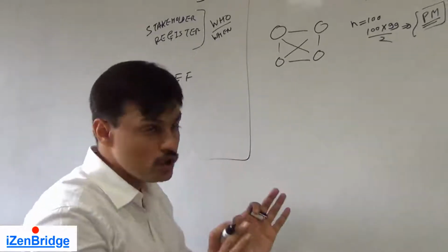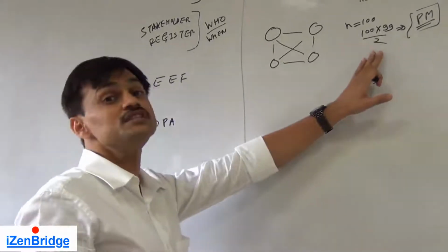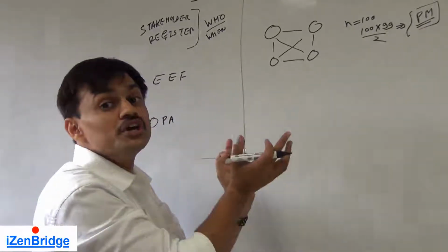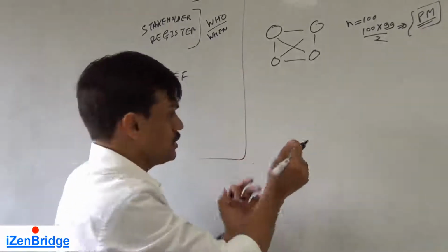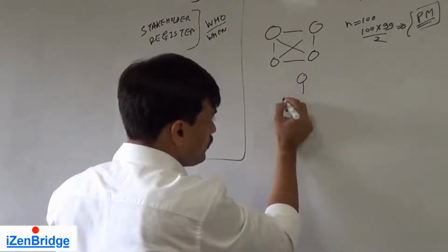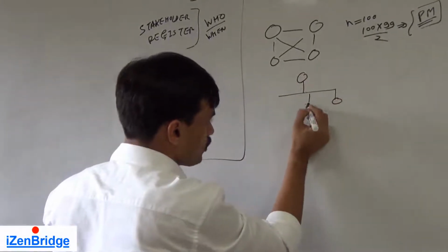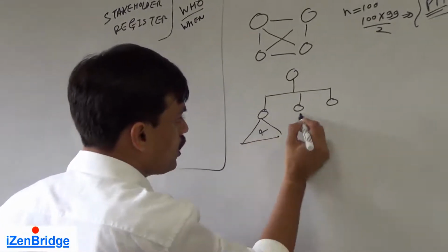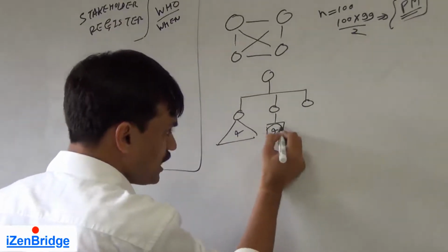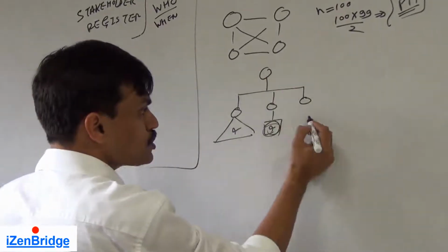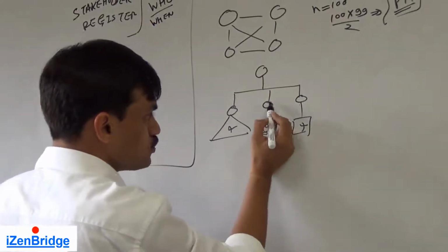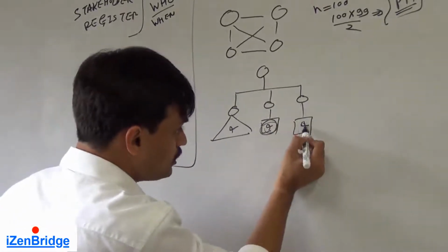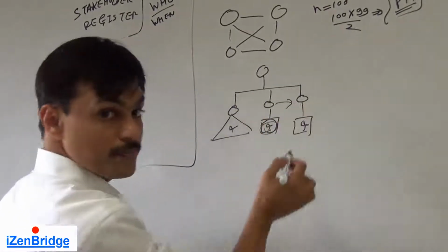So what should he do? He should think of reducing the communication channels. How can it be done? By creating communication barriers or hierarchies. Like I will say that there would be a person and he would be supported by 3 people, and inside these 3 there would be a team of 4, and they can communicate with each other, but whatever communication goes to this particular person only goes through this one. And if they have to communicate with the other team, they will go through this communication channel.